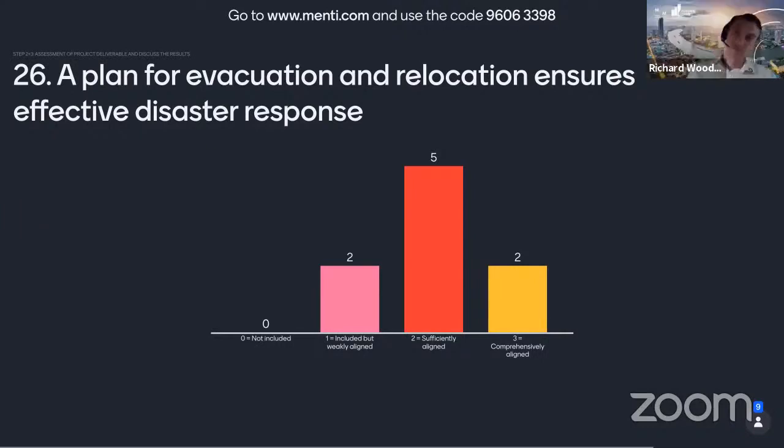Sorry, I should say, I do actually have a copy of the actual tailor-made assessment sheet for the project. I didn't want to jump in and give the answers, but this is something to be aware of when you're doing the assessment. We do the assessment at different stages of the project. On this particular project, we're looking at having 5 assessment workshops. We've just done the 3rd, and these scores progress as you work through the assessment.